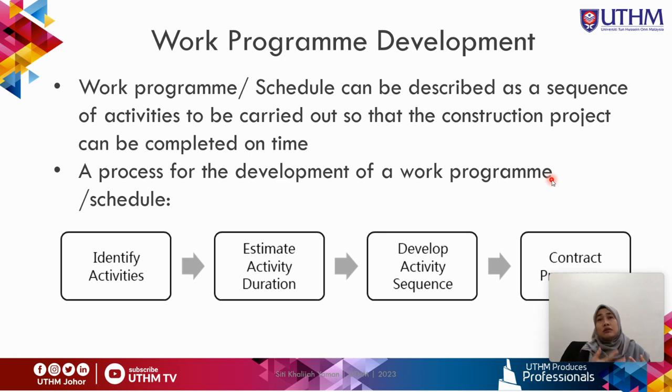It is very important so that you can properly manage and plan all the activities according to their sequences, so that the construction project can be completed on time. We don't want to miss out any activities, because if we miss any, we might miss out the resources, and it will cost additional time if you need to find the resources or place your orders for the material. Then it will cause delay to the whole project in the end.